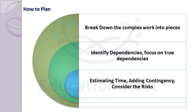In practical situations, estimation can never be perfect because in the bidding stage the client would have given a high-level requirement, then comes one estimation. When you come to know the detailed requirement, your estimation keeps changing. You should always have a process of convincing your customer that the estimation can change and re-estimation needs to be approved if it is logical. These things must be mentioned in the scope of work when the contract is given, because many clients have the illogical demand that one-shot estimation is enough — but it is never possible because requirements keep changing.